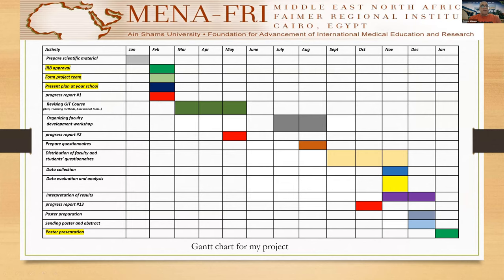This is my Gantt chart. Scientific material was prepared in January 2021. IRB approval with formation of the project team and presentation of the plan to my college was in February. The first progress report was submitted in February 2021. Then revising of GIT took place in March, April, and May 2021, with organizing a faculty development workshop in July and August. The second progress report was submitted in May 2021.